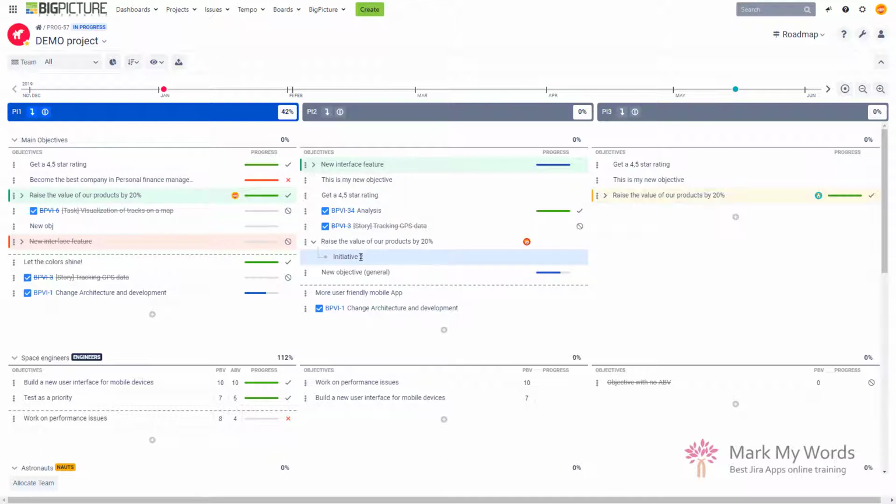And basically, when I'm teaching how to use the roadmap, I'm usually telling you that these first level elements that you have here are actually not tasks. These are objectives. They're not supposed to be your Jira issues. And then, of course, to fulfill those objectives, you need to create Jira issues that will have to be completed to realize a certain objective. Previously, we didn't have any good way of mapping that, but now we do. So now you can create the tasks associated with those objectives underneath your objectives. So that's a pretty cool thing to have.